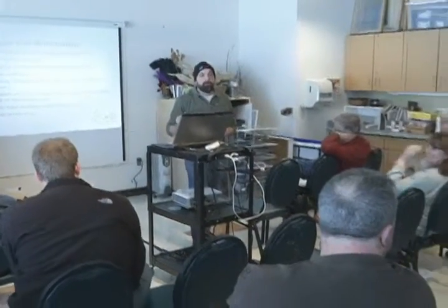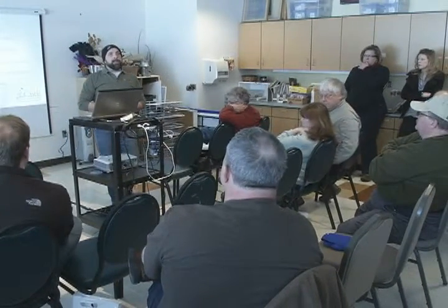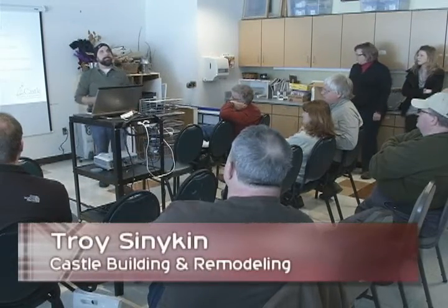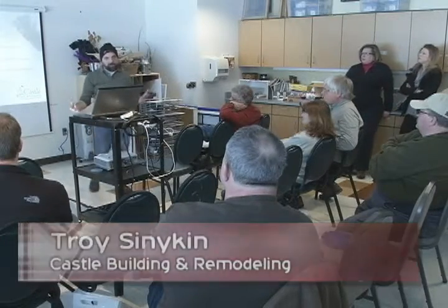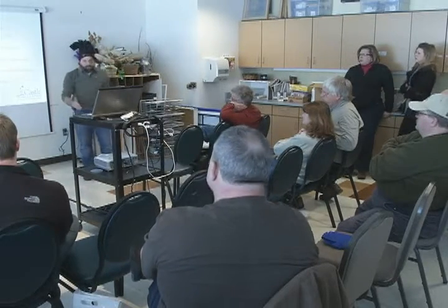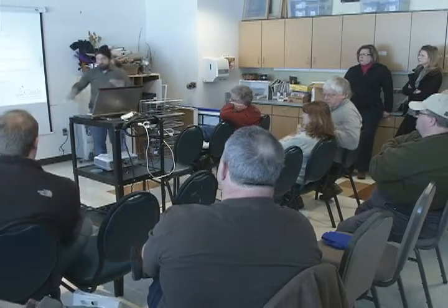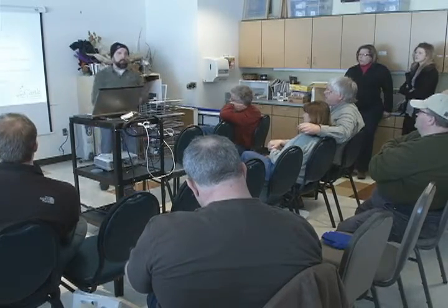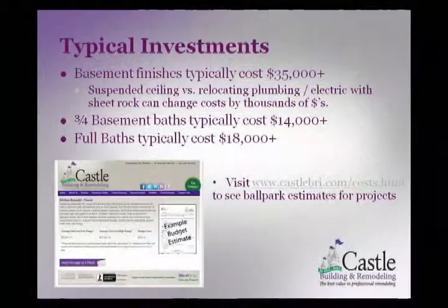Talking about moving stairs or changing stairs, what's a ballpark figure for how much that is? Well, I just did a quickie the other day and we're up at about 10 grand. That one affected the attic and the main floor. It wasn't main floor to basement. The biggest thing is how close are your existing stairs to legal? Because as I said, once we touch them, every tread is 10 to 11 inches and every riser is 7 to 8 inches. That's it, it's got to be in there. Where does a landing occur and so on? So it kind of depends on shape, but that's some idea. And that's why it's a big deal to get into it, in addition to maybe you're losing some space on your main floor and it doesn't fit.